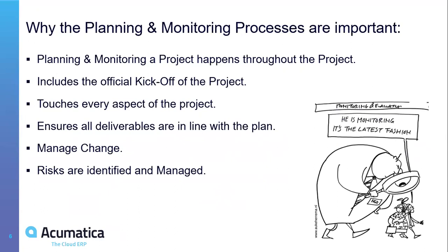Why is this so important? The price your sales or management agrees with the end customer for the services is based on mandates, right? Even if you do a fixed price project, you estimate the mandates that are needed. So these mandates are estimated based on the scope that is agreed, which means which modules are included, what tasks you are doing, and what tasks your end customer is doing. And it's your job to monitor, track and follow up to make sure that everything in scope is delivered, but that everything out of scope that is still requested or required in the project will require a change request.